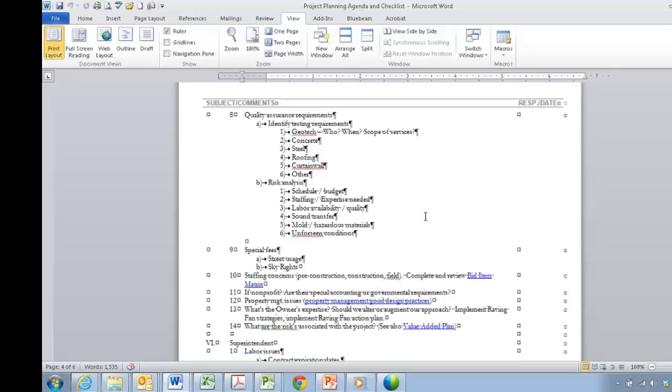Then there's a full-blown risk analysis, and that is where I always like to bring in every aspect of our team all the way up through our VP to just present what we're talking about on the job, understanding where we're at, where the opportunities are, and where we also need to be concerned, so everybody has that common understanding and those sensitivities. This is just an initial list. You can make up a list of 20 on probably every project. The ones that you always need to speak to on every job on the risk analysis are schedule and budget. Some of these other ones may be viable on jobs, some of them may not, but I guarantee you there's a top 10 on every single project after you review schedule and budget.